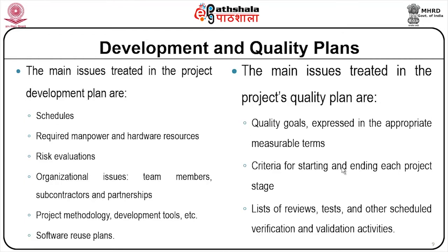The main issues treated in the project's quality plan are quality goals expressed in appropriate measurable terms, criteria for starting and ending each project stage, lists of reviews, tests and other scheduled verification and validation activities.